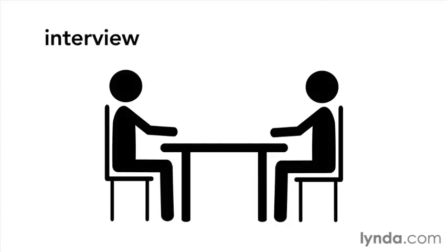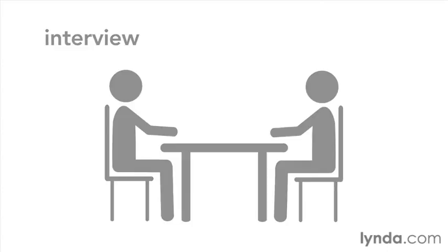You can also interview people. It's a good idea to put together specific questions for the first round of interviews. That way, you ask everyone the same questions and don't leave anything out. A second round of interviews can help clarify and refine the requirements. With your goal in mind, document your requirements by writing detailed statements of what must be accomplished in the project to satisfy the objectives.